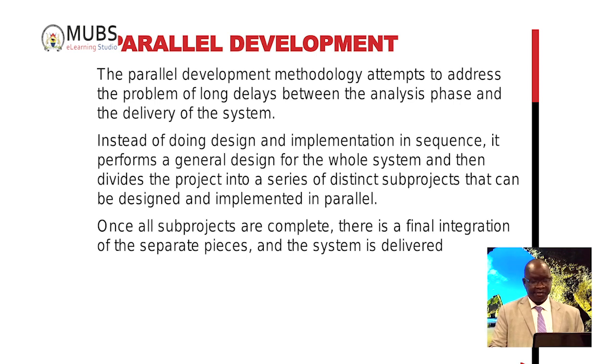Then you have one overall design, which you then split into a number of designs, such that one design moves in parallel with the other design. So you create what we call sub-projects. From one project, you may create 3, 4, or 5 different sub-projects. And each of these is implemented in parallel to others.